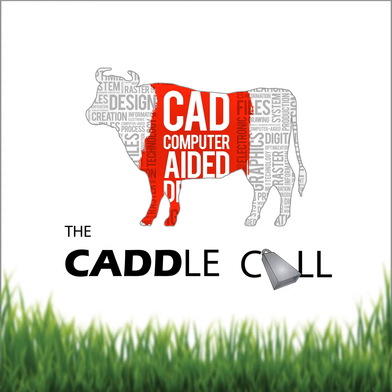Those tools can be preset with every conceivable display property, so they all look the way you want, just like the markups, with all the text values and everything that you want. But more importantly, they can be defined with preset properties. What that means is that you can have the system automatically calculate whatever you need, whether it's the weight of your duct, the cost per linear foot, the make, the model, the manufacturer, when it was delivered, when it was shipped, whatever you can conceive of. All of those pieces of data can be predefined and added to these tools so that whatever you need to track is automatically put into the takeoff just by drawing.